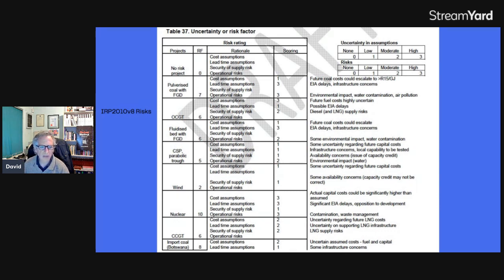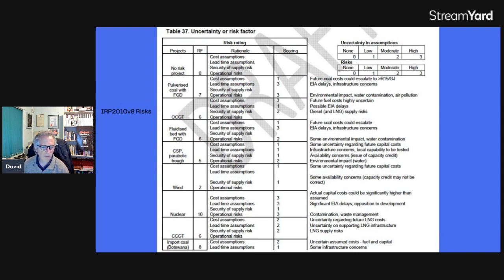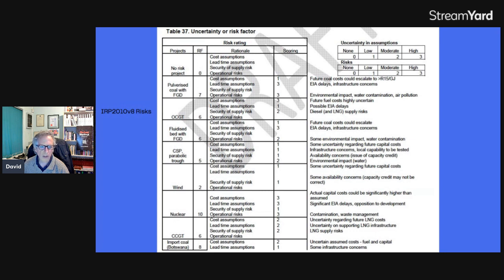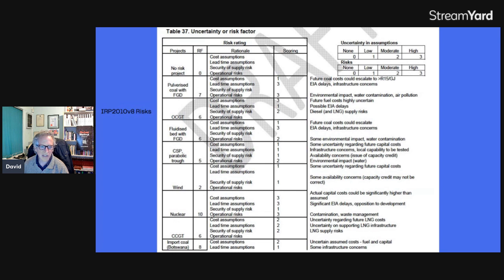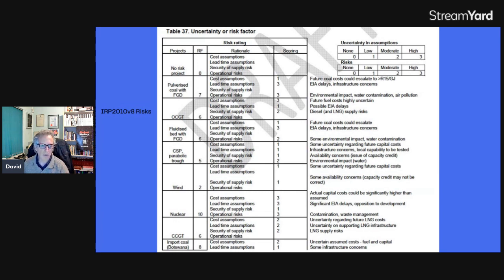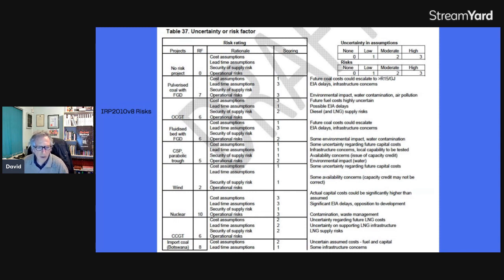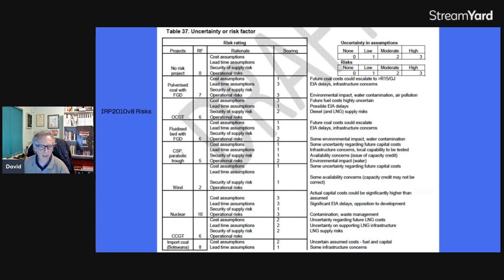It had this Table 37 of risk factors of different kinds of energy. So no risk, if there's obviously, if there's a no risk project, the risk factor is zero. The cost assumptions of scoring is zero. Lead time assumptions, zero. Security of supply risk, zero. Operational risks, zero. So what zero means is no risk. So if we don't do a project, there's no risk. There's no cost. There's no lead time. It happens instantly. There's no security supply problem because there's no problem and there's no operational. So if we do a project that has no risk, which is whatever project you do, there's always a slight amount of risk. Even if you installed an air conditioner or a pool pump, there's always a risk that maybe it's dead on arrival or something.